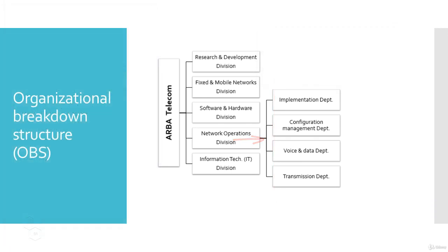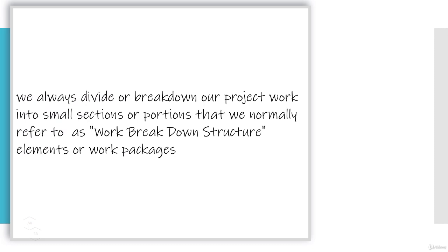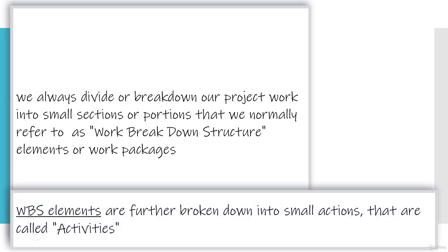Please note that we always divide or break down our project work into small sections or portions that we normally refer to as work breakdown structure elements, or we simply call them work packages. Don't forget that these work packages are also called end results or deliverables. Important to remember that we further divide these WBS elements or work packages into activities. And then the work on these activities is normally carried out by the individual team members within the project team.